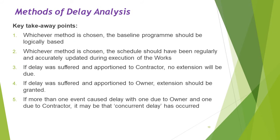Some takeaway points. Whichever method is chosen, the baseline program should be logically based. Whichever method is chosen, the schedule should have been regularly and accurately updated during the execution of the works. If delay was suffered and responsibility apportioned to the contractor, no extension will be due. If delay was suffered and apportioned to the owner, an extension should be granted, together perhaps with delay costs. But if more than one event caused delay — one due to the owner and one due to the contractor — it may be that concurrent delay has occurred.